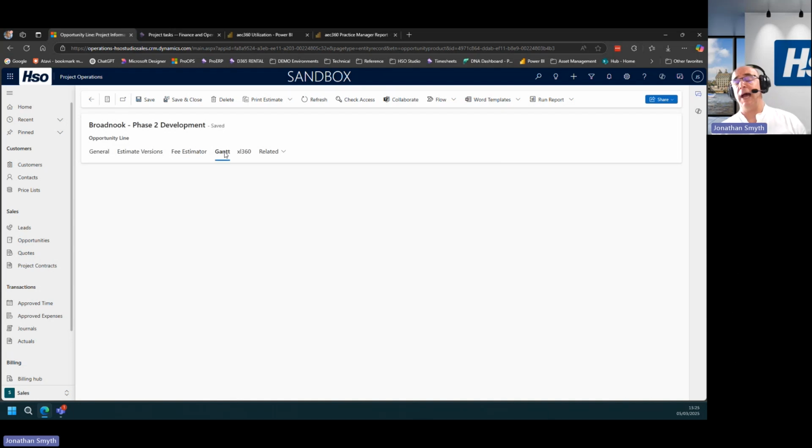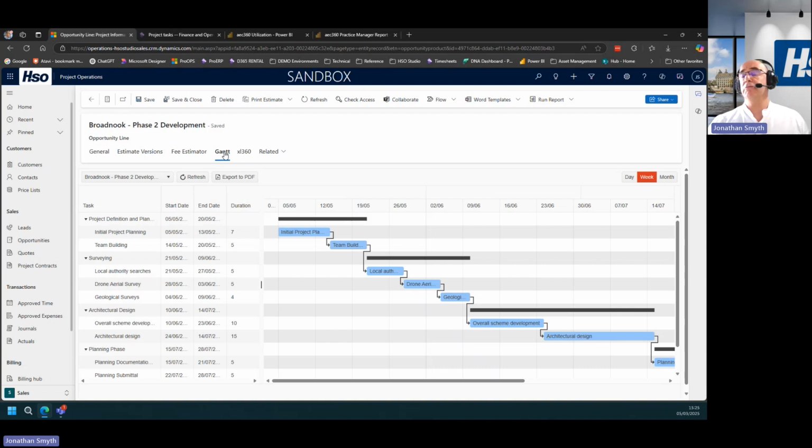In addition, if we're looking at creating something a little more visual, so it's nice and easy to understand the relationships between the various different work breakdown structure activities or tasks, so these things here, then each of these is represented as a block in this specific timeline here. And if I just hover over, we can see the node at both the beginning and the end of each of those tasks. And creating interdependencies or relationships between those is really just as simple as clicking and holding on to the node at the end, and then dragging an arrow to the various different tasks that we would like to create those relationships with.